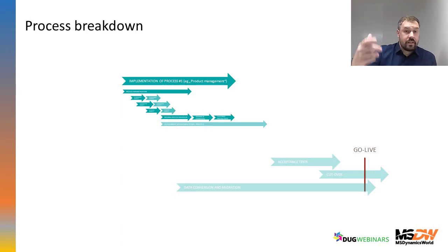So releases are after the validation from the customer. Releases are made, everything is parameterized and so on. And when I finish everything that is important for acceptance tests, so priority one tasks, then I start with internal process validation because I have everything, and I will simulate the tests from the customers